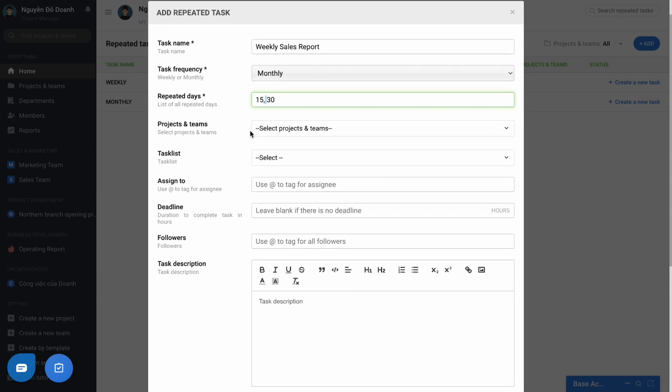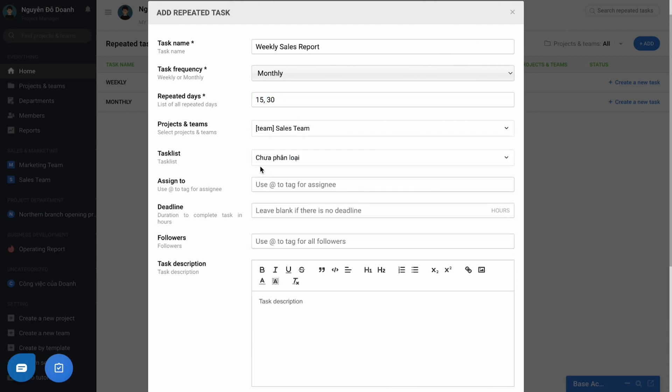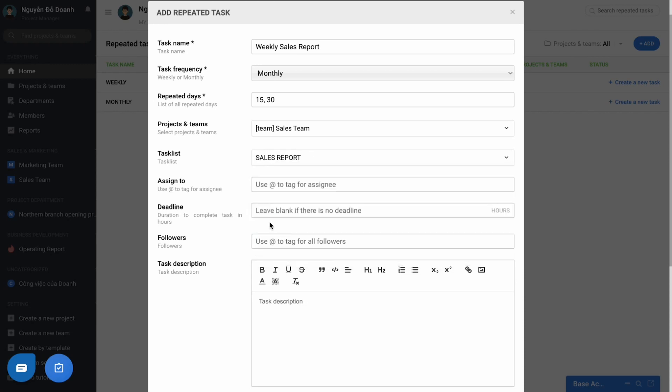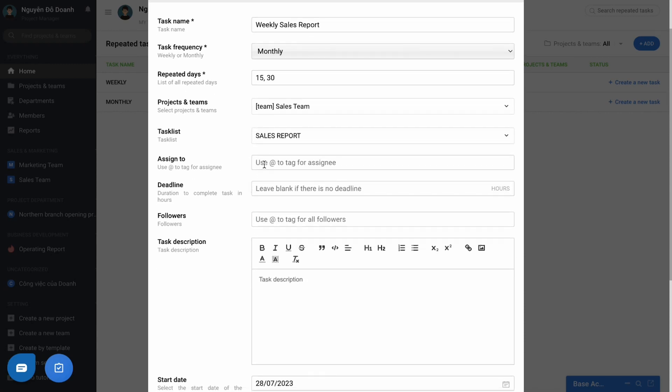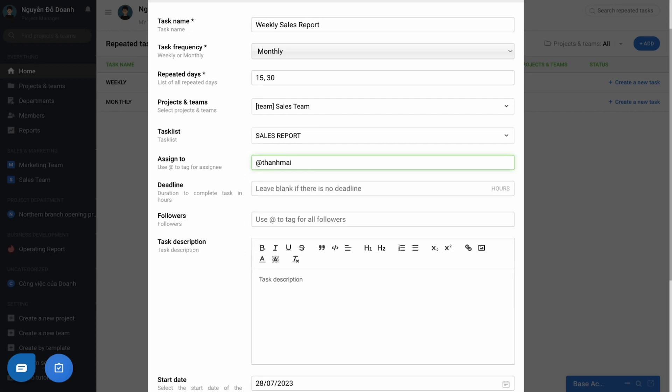Arrange this work into the project or team. Classify the task list of the project or team. Assign by tapping Add to assign the task, and the deadline. Fill in the number of hours to be completed.